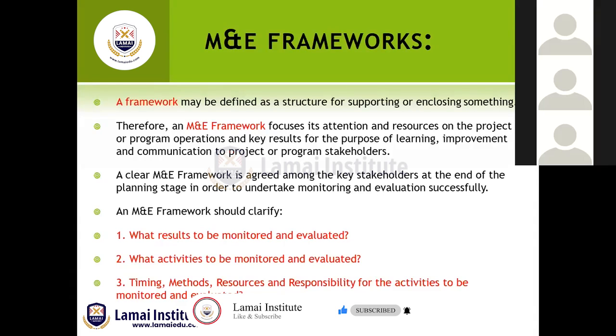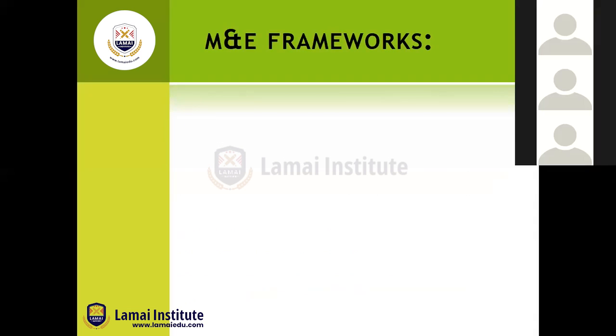And that's why the matrix should capture some of these components: what are the results, what are the indicators, what are the activities that need to happen in terms of monitoring and evaluation, what is the timing, what are the methods that are going to be used, what are the resources that are going to be used, and who will be responsible to ensure that the M&E activities are conducted as expected. So it's good to understand that.